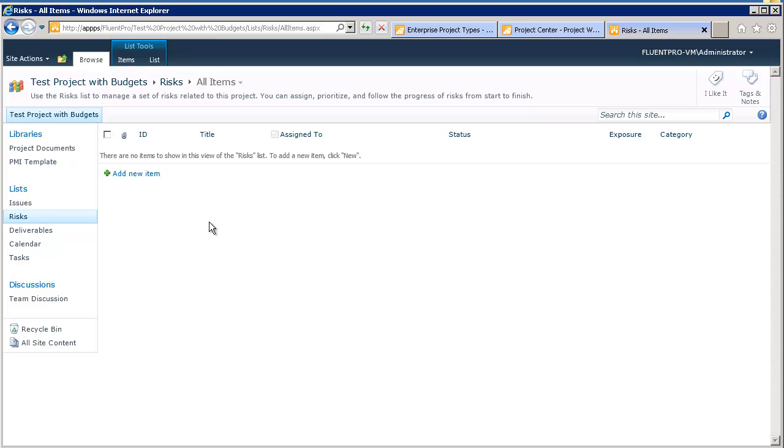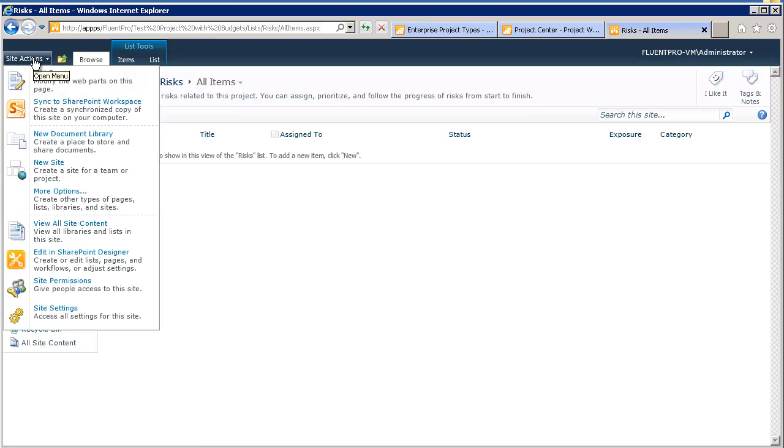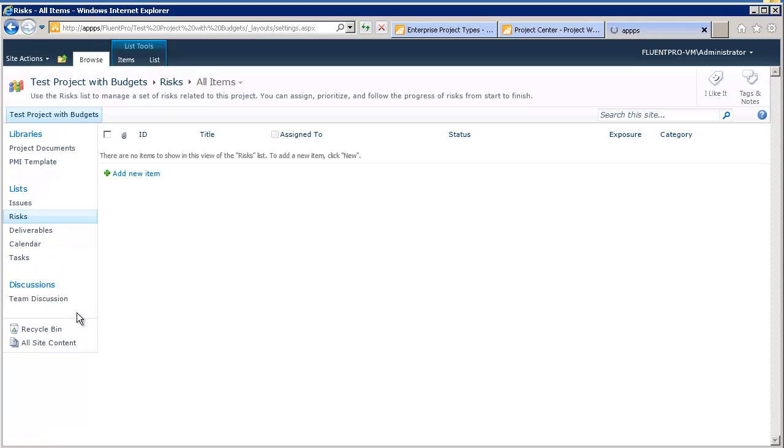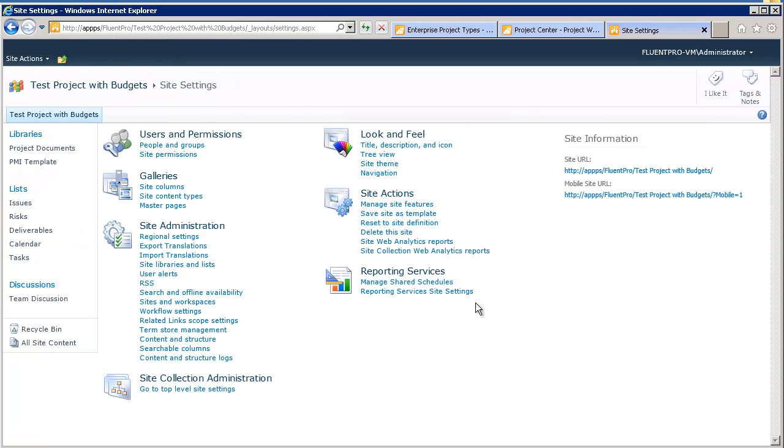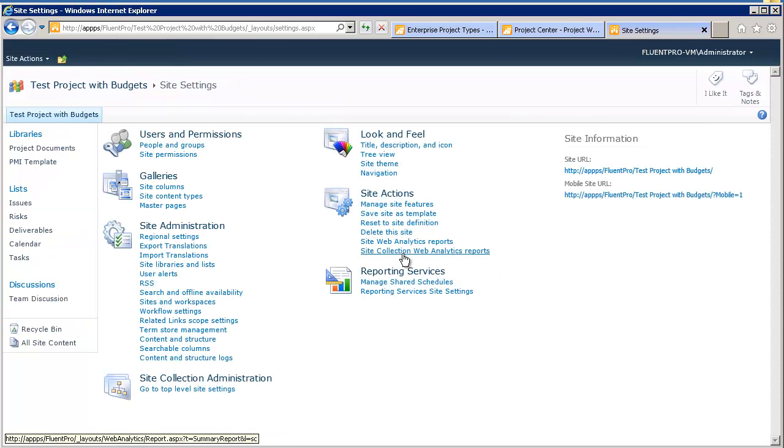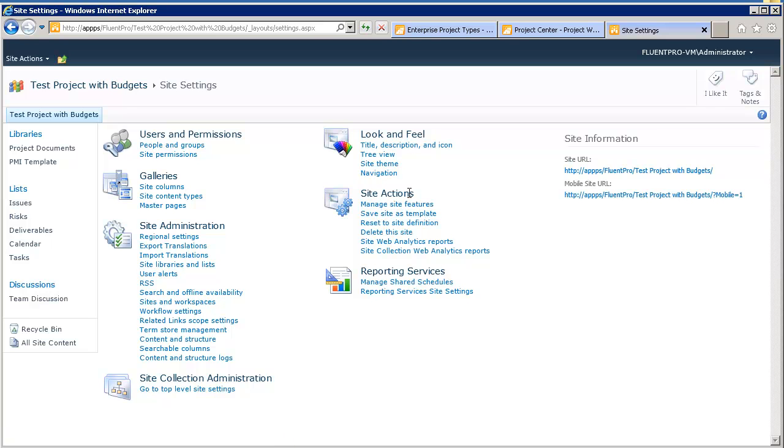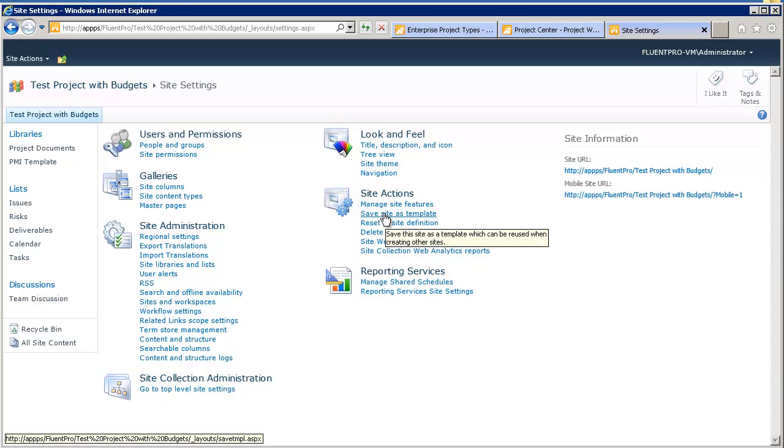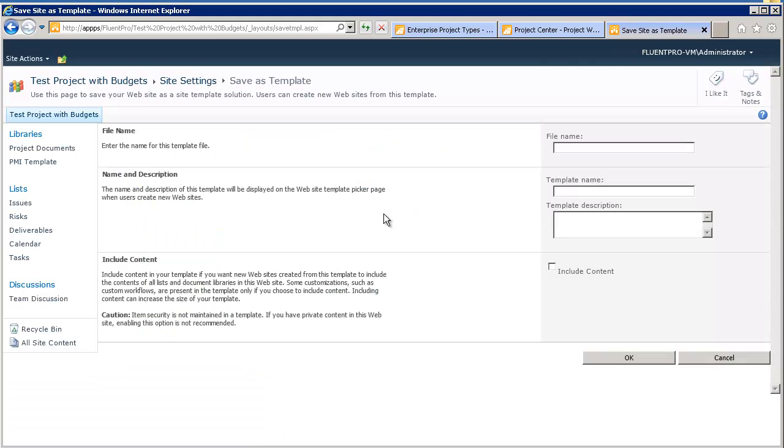Right now, to save a template, you go to site actions, site settings, and click on, in the site action settings, there is a save site as template.